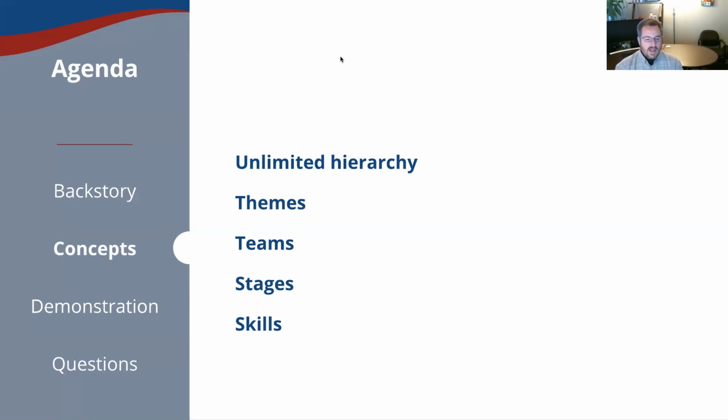And then there's the idea of stages. So there can be an automated assignment of, well, 10% of the work that goes into our issues is in preliminary documentation and design. And then 75% of the work is the development work. And then 10% of the work is testing. And then the last 5% is final documentation and deployment. You can have these stages of an issue's life cycle pre-identified. And this really helps with projections and with some of the ideas in Portfolio around future scheduling and scenario planning, and we'll be looking at that in a moment as well.